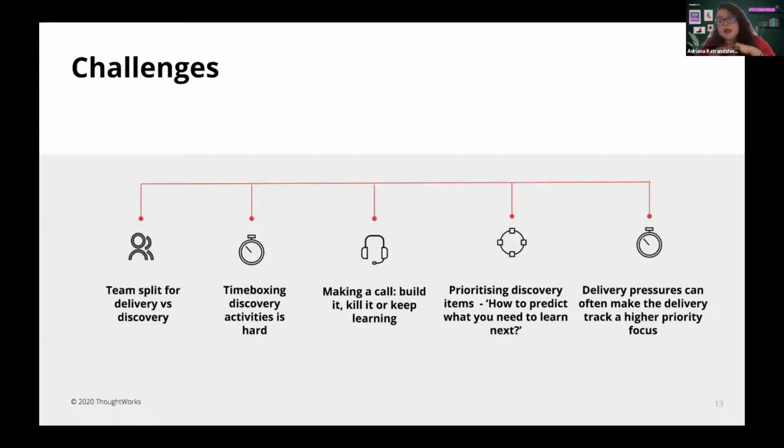In the other organization, what we did was, when we were prioritizing discovery items, they would go through a lightweight value canvas of some sort, where you define how to test it, and you defined the relative effort and value, and that's how we managed to prioritize the hypothesis.